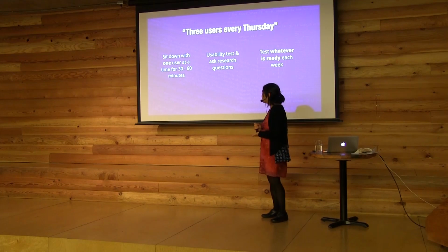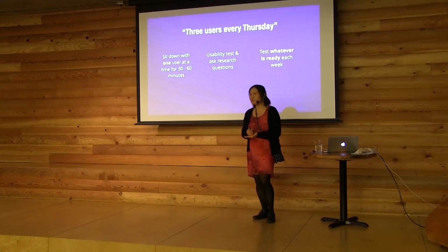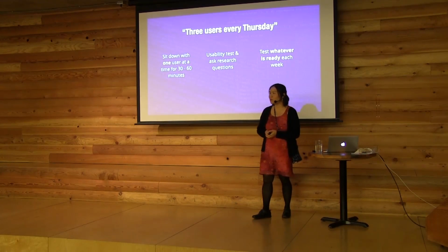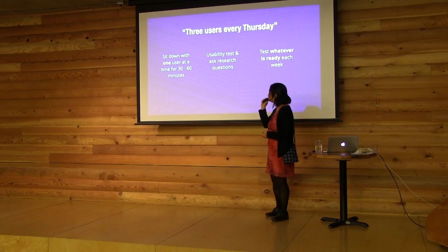I think they started off with bringing in 3 users once a week, which is kind of the practice that's suggested by the Lean UX book. I think Meetup's up to more than that. I think they're bringing people in every day or something. So yes, bringing people in.